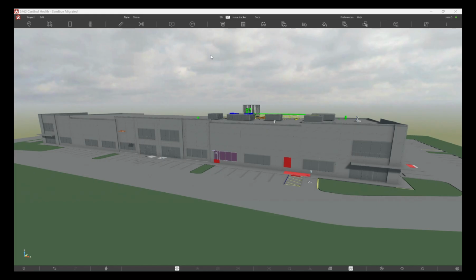And then going into the Tuesday meetings, those covered the drop zone coordination. Mainly, that was the crane coordination, roof logistics, and any subcontractor concerns. I talked about this a little earlier on, how we have a machine that we're going to be dropping through our roof hatch. That's over the back. I can show you this really quick.